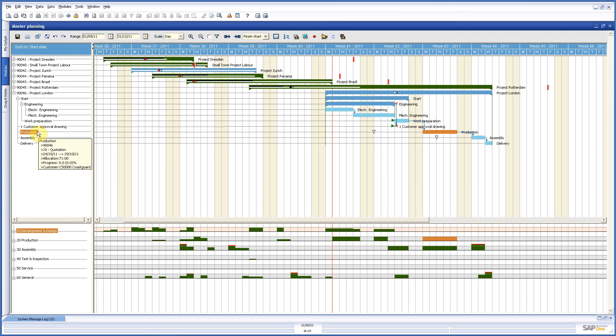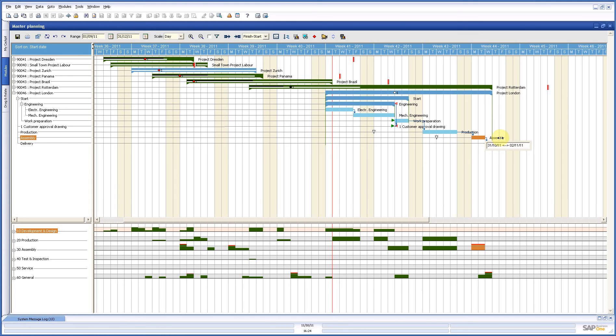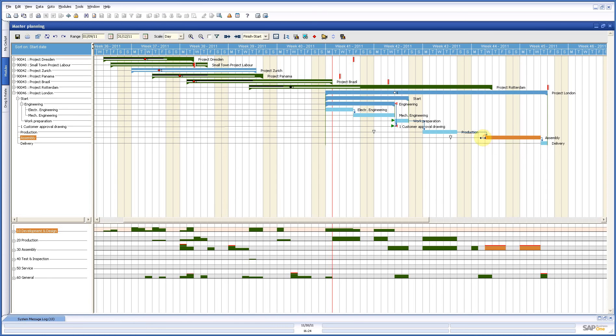If we look at production, we see that we have an allocation of 71 hours, and that's what we need here in this timeframe. Now, we see here a little problem with assembly as well, so we make that a little bit longer. And we need even more than a week.